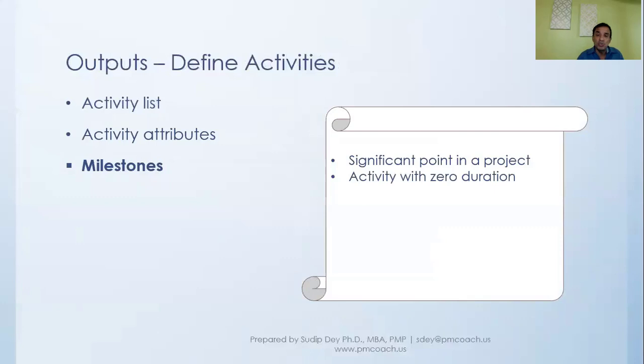But these milestones we'll put in our schedule as an activity with zero duration. It is not that we are doing something at that point of time. It is just that we have reached that point.